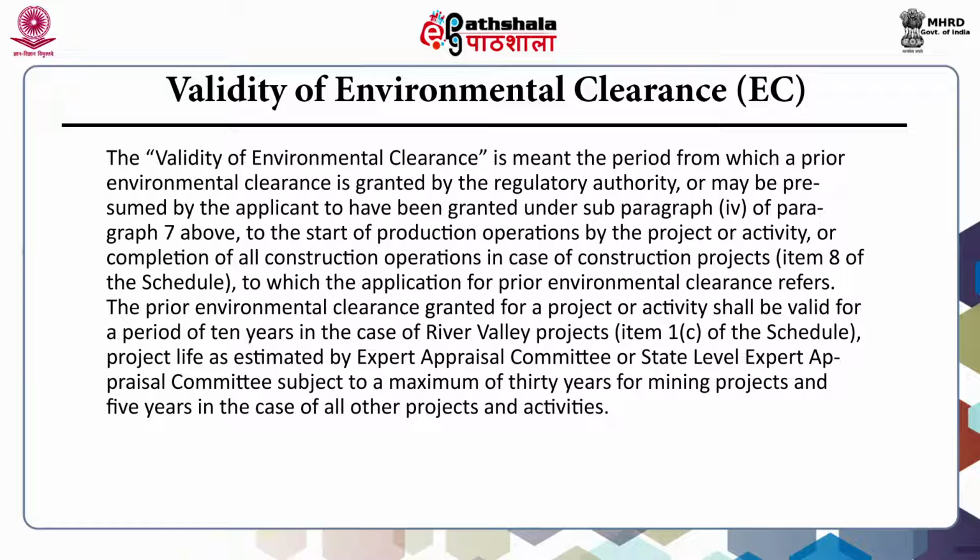The prior environmental clearance granted for a project or activity shall be valid for a period of 10 years in case of river valley projects, item 1C of the schedule; project life as estimated by the expert appraisal committee or state level expert appraisal committee, subject to a maximum of 30 years for mining projects; and 5 years in case of all other projects and activities.